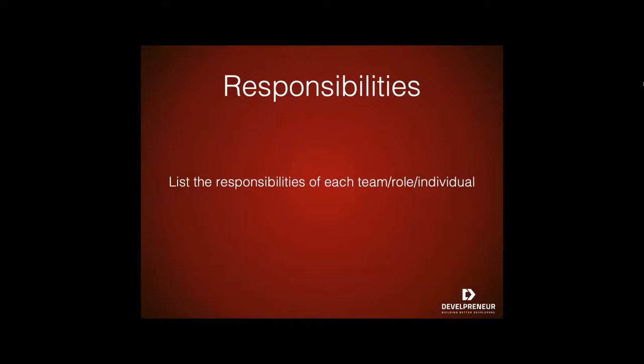Each test task identified should also have a responsible person assigned. This includes all areas of the plan. So for example, setting risks, selecting features to be tested and not tested, setting overall strategy for this level of the plan, ensuring all required elements are in place for testing, providing for resolution of scheduling conflicts, especially if testing is done on the production system, who provides the required training, who makes the critical go, no-go decisions for items not covered in the testing plan, and then who delivers each item in the test item section.